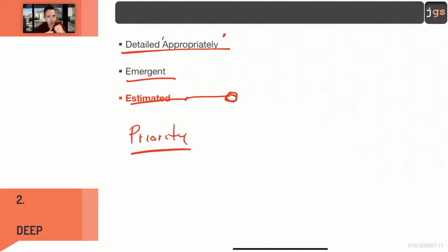Yeah, also the epics, good question. Also the epics are going to have an estimation. For the epics, I am going to show you the slides, but the estimation is a little bit more open. For instance, you can use small, medium, large, or extra large epics. It's a really big approach for epics.